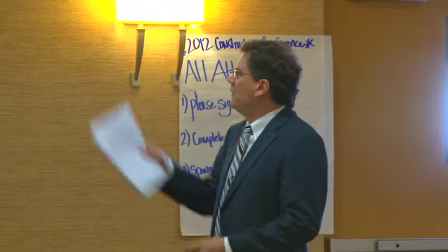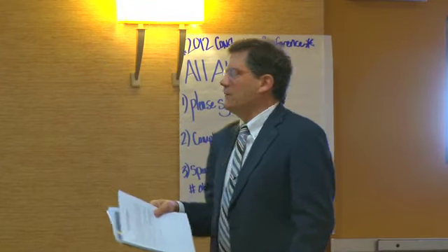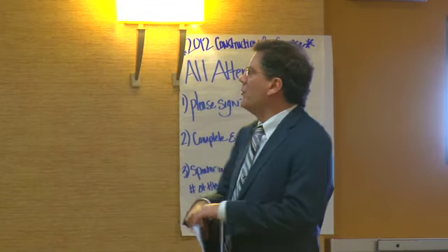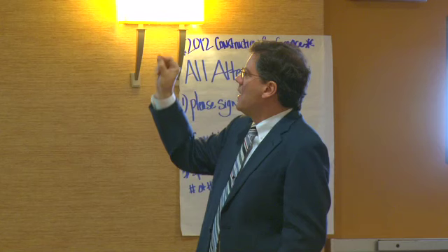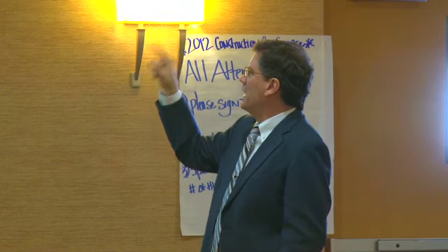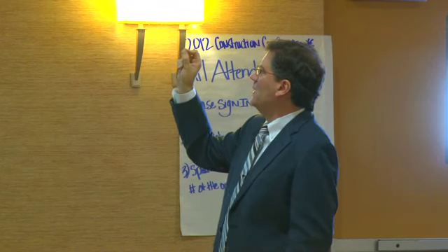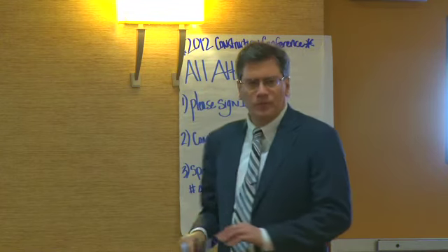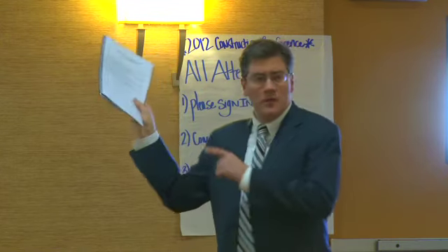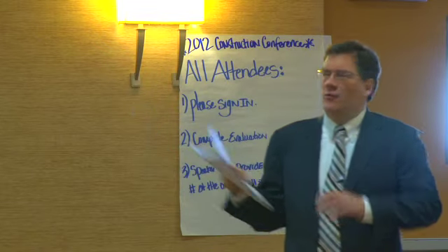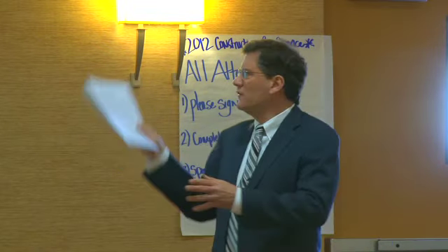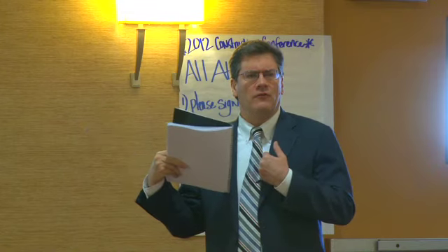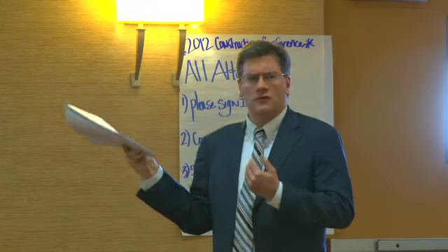So what you've got to do is scratch out any claim for payment, or put a caret above it, any bond or lien claim for payment, and a caret, lien or bond rights under any similar statute. We have these in Word, so we make that change automatically. And we don't even explain it to the GC or the owner, because they don't notice it, and we have a fairness right to make that alteration.